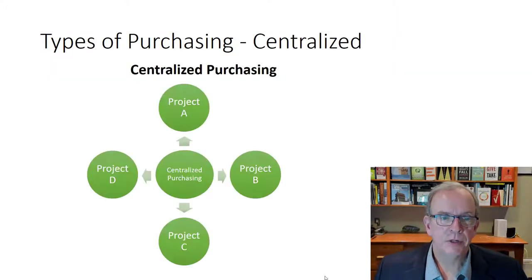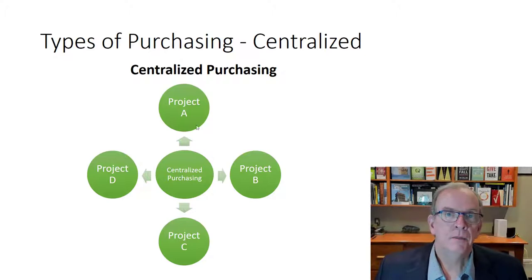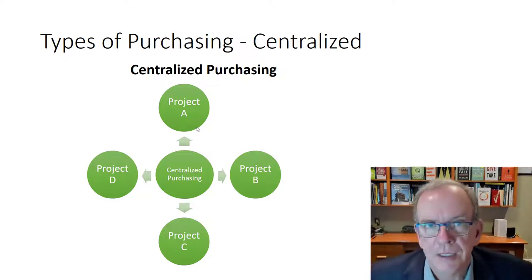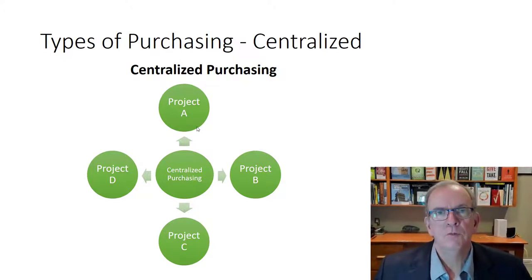And different types of purchasing. You can have centralized purchasing that takes care of all of the purchasing. That means you would have somebody in charge of purchasing for the company. They would build up relationships with all the suppliers and negotiate deals. In some cases, they may negotiate that in a particular year we are going to order at least X amount of cubic meters of concrete from you, but we expect this pricing. That gives that opportunity when it's centralized. That can be very helpful.